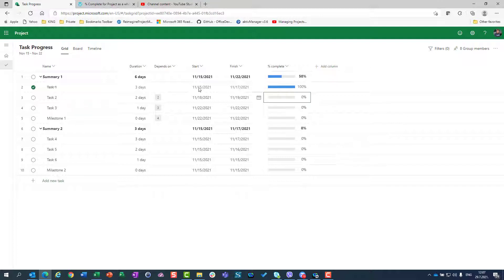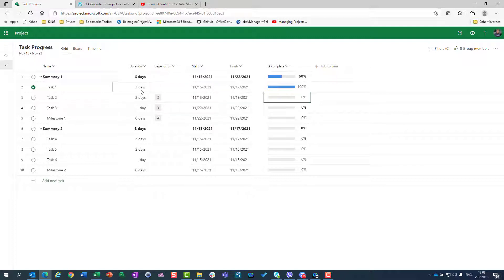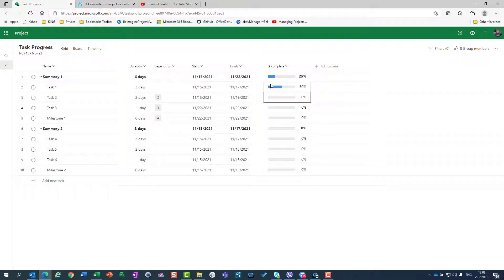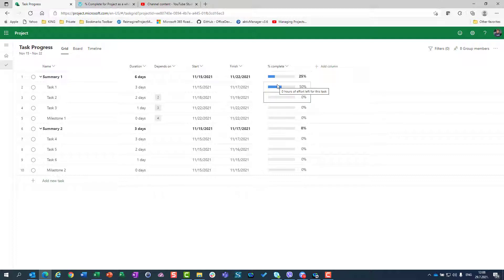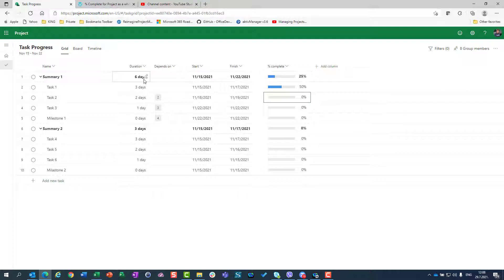Because three days were done, and the total duration is six days. So, three days done means that 50% of six days are done. What if I put here 50%? If I put here 50%, then it means that 50% of three days are done, which results in one and a half day is done.